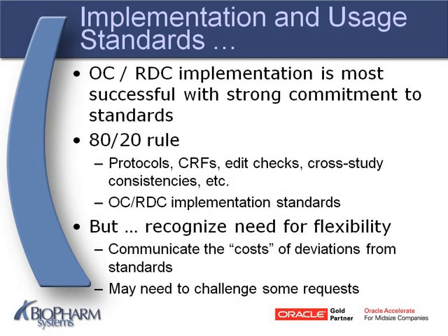Sometimes I think it's important then that you communicate the cost of that deviation. If somebody wants to change the entire form, here's what that's going to cost you. It's going to take a lot more time to build the study. It's going to take a lot more edit checks. It's going to take a lot more this and that, time, effort, everything. So communicate the costs. And then also sometimes you just need to push back and be ready to challenge some of those requests, with the question, is this really necessary, or is this just a nice to have? If you're asking for it just to ask for it, it's not a good enough reason.